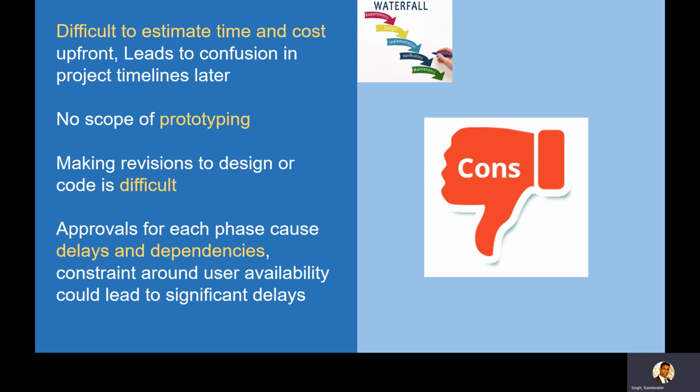If you have to make changes to code, then the developer says, go ahead and make changes to design. If you have to make changes to design, then there is an ask that, go ahead and make changes to requirement. So basically it adds more difficulty to change anything in the waterfall model. That's the reason we have talked about why it's not flexible.